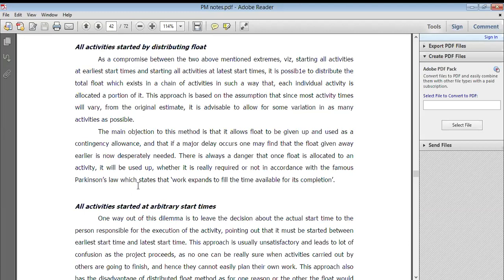If I am busy in a meeting and my A group team is working, right? A group means there are only 10 or 5 people. But I was busy in the meeting for 3 hours and all A group is waiting for my approval, because without my approval they cannot start the next activity. So 3 hours wasted. Got it? When I come after that they will start, means a total of 3 hours wasted because they are waiting for that particular approval from me.